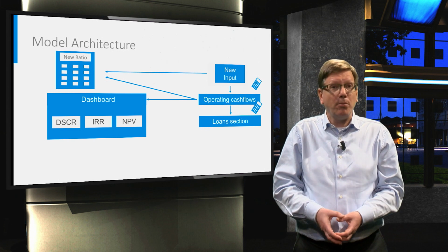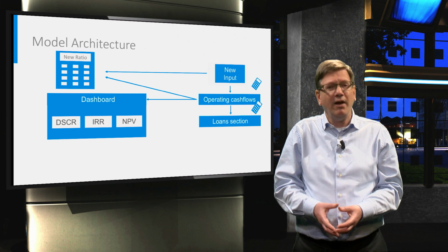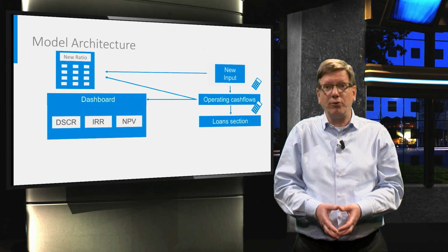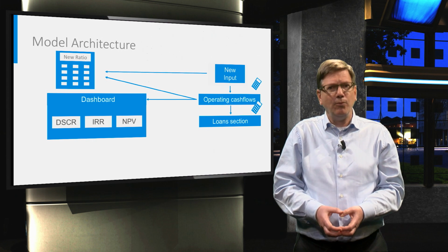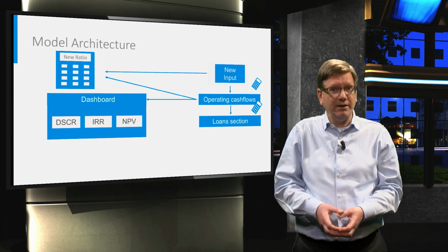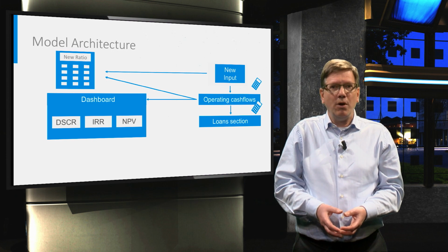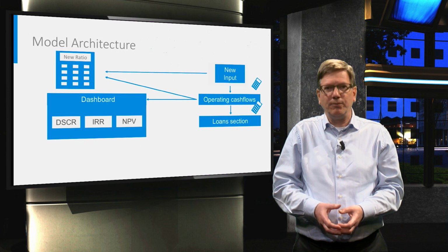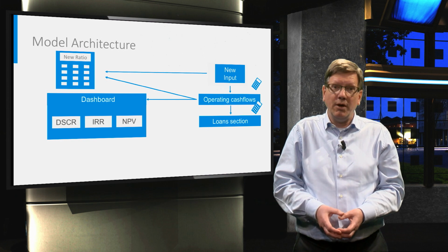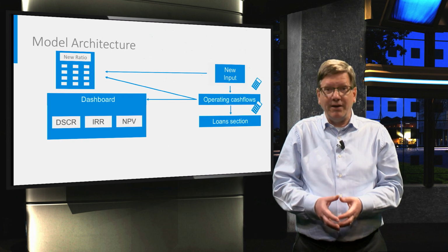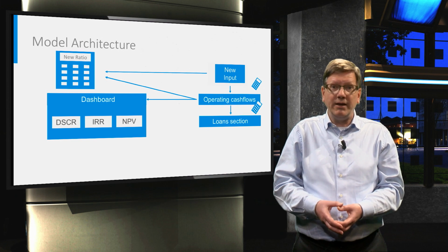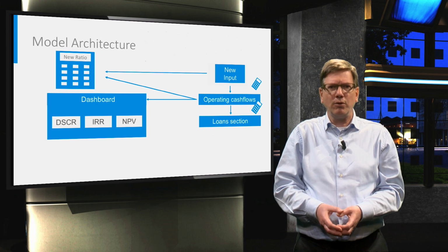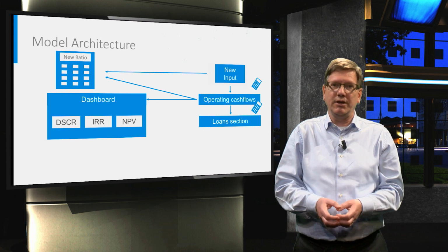Lenders and investors will probably want to receive a copy of your project model very early on to decide if it's worth putting time into examining your project proposal. That model will tell them exactly how attractive the project is, and it will show what the biggest risk areas are. If we can show that we have ruled out risk situations occurring, for example, because we've entered into an offtake agreement that fixes our revenues, then they will more likely lend into our projects. Usually, we see that the model also becomes part of the closing documentation.